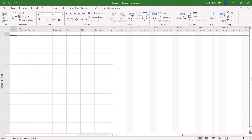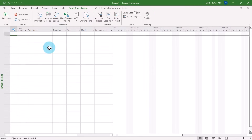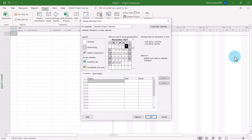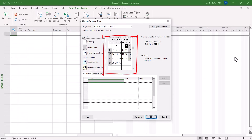To begin the process of creating company holidays on your standard calendar, first open any project. You can see that I've opened a new blank project. Then click the Project tab to display the project ribbon and click the Change Working Time button. In the calendar grid at the top of the dialog, select the first holiday that occurs on a specific day of the month.